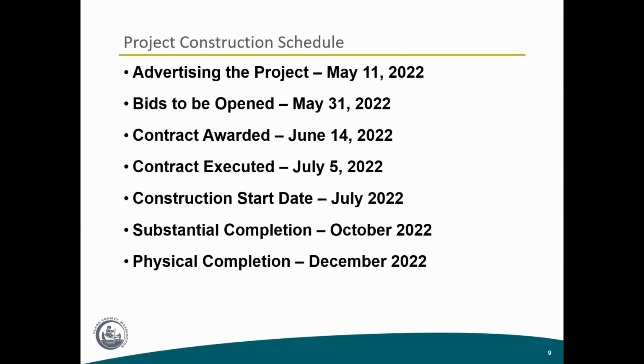Here's the construction schedule. We plan on being out on ad May 11th, 2022, and the bids will be opened on May 31st, 2022. Then we'll award the contract mid-June 2022.